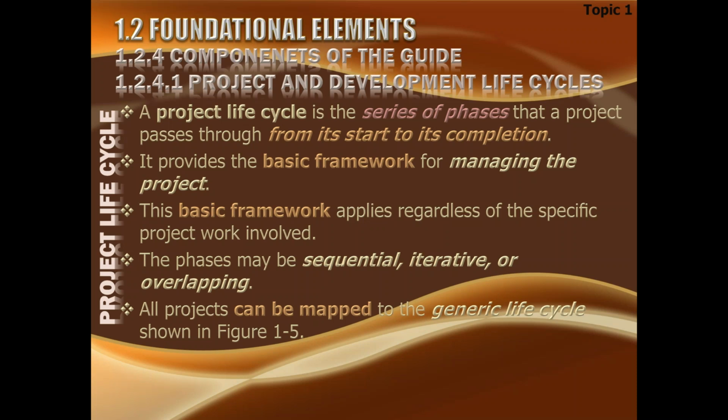This could be your gray structure, and then comes the finishing work, which is all the electricity and wiring and plumbing and painting and distempering and all that, all finishing installations and everything. This could be your fourth stage, and ultimately, let us keep a separate phase for handing it over.